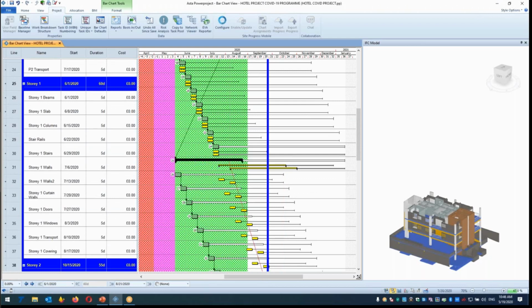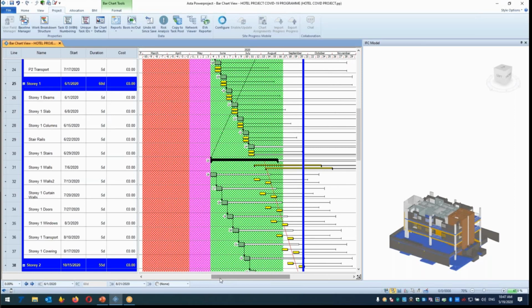And start the parallel way of working, so of course you need to respect the logic. You cannot build the second floor before the first floor, but you can aggressively schedule options, for example, when the first floor is 50% finished, you can start the preparation of the second floor. This is a subject about how you approach the remaining time, but you can change the link. Unfortunately, that kind of pandemic situation does not happen very often. That's why, in my opinion, you have to change the links for the remaining schedule to be able to catch up with the program.